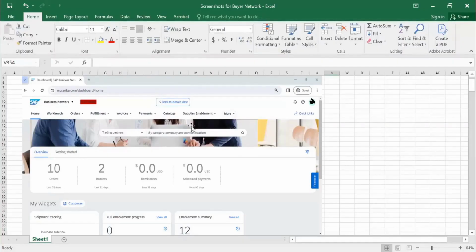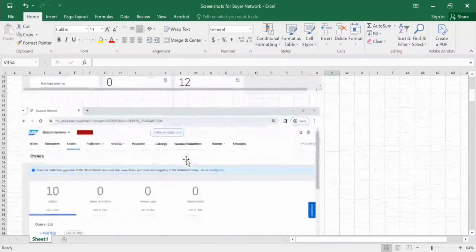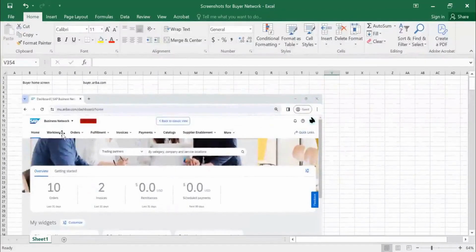In the explore phase, you are going to provide an overview of the features and functionality of the cloud service, provide data collection, and review the completed template. But here, mostly in the explore phase, you are going to decide whether you are going with the sourcing module, or Ariba suite, or Ariba contract management, whatever modules you are going to choose. In most cases you decide this in the explore phase. Once it is done, during your realization phase, your systems are configured using your test.